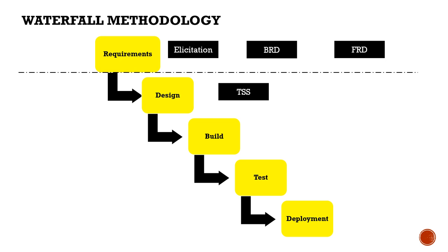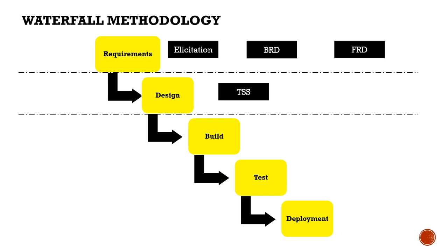The business analyst also reviews the Technical Specification to ensure all FRD items are covered. The document contains infrastructure requirements, database requirements, and pseudocode. It varies from project to project, but the concept is simple: it's the design to deliver the functional requirements. Once reviewed and signed off, this completes phase two and we move to phase three — build.